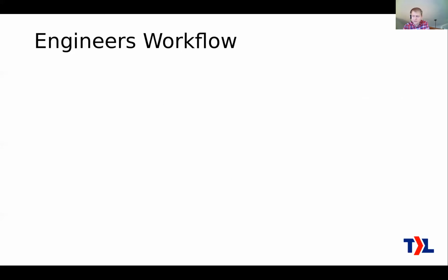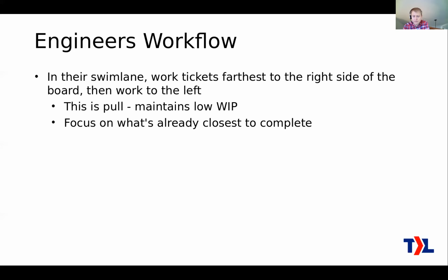Now, a couple more details about how the engineers work from this, because I know that's a change for some people. In the engineer's swim lane, they're going to be working tickets from the farthest right side of the board, and then they work to the left. So when an engineer has just finished a ticket, they're asking, what do I work on next? Compared to you as a project manager, you're focusing on the work moving from left to right. The engineers are looking for work from right to left.